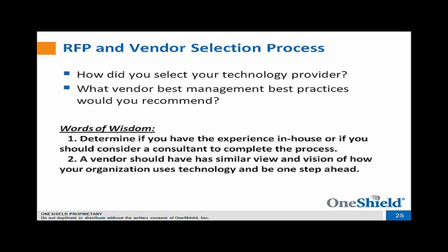What we try and focus on is requirements around what the carrier does that's different, and understanding those gaps between their unique behaviors and what these products offer out of the box, and including those types of questions in the RFI. So we go forward with a lightweight RFI and then move into a very detailed demo and then on to references. What we are finding is that carriers really are prioritizing out-of-the-box functionality. So, what are those gaps around the way my products and the way I do business versus what comes out of the box?